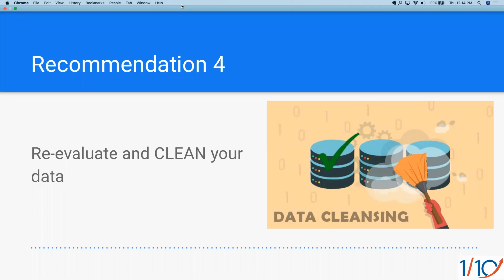Oftentimes organizations I work with say, well, we're just not going to worry about it. We'll migrate it into the system and then we'll figure it out then. And that always seems like a great idea, but I rarely see anybody go back to clean their data after the fact. And so what that leads to is, you had dirty data in your old system and now you have dirty data in your new system. And this sort of takes away from the trust and reliability of your data, trust in the reporting. People are just happier with their spreadsheets that they know are accurate. So definitely having clean data and only relevant data is critical as you move into a new system.